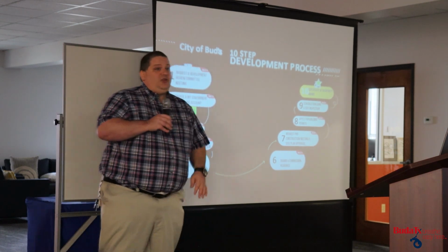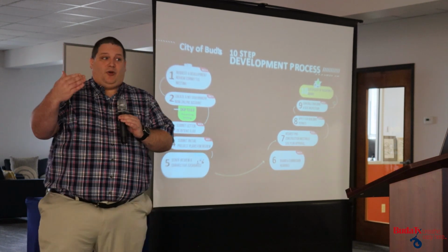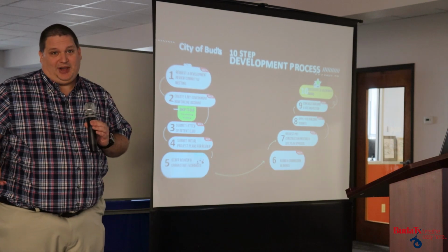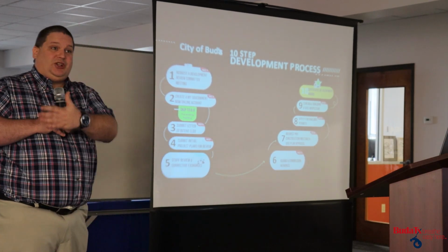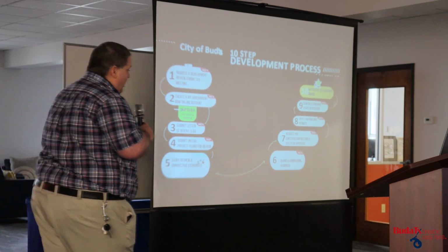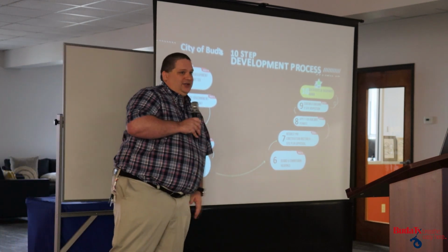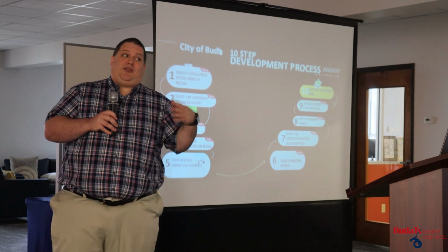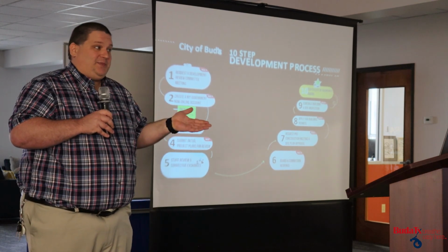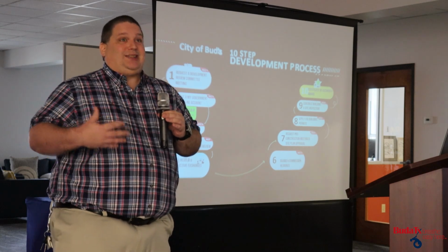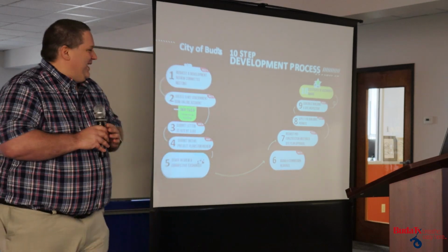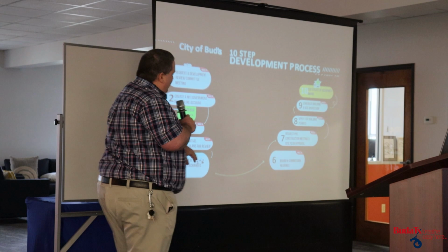Then, if your project requires it, for instance, for most kinds of plats, for a specified use permit, for historic preservation, like Will was just speaking about, we're going to go to our board and commission hearings. So sometimes the wait on these projects is, if you need to go to HPC, well, we meet once a month. So if you want to get your project done in a week, that's going to be difficult. But we're going to have our board commission hearings.